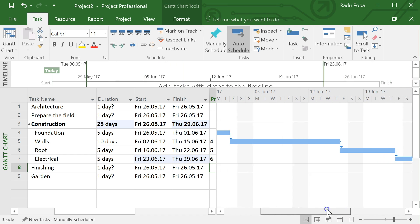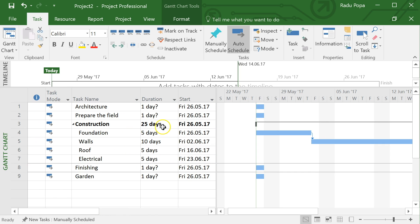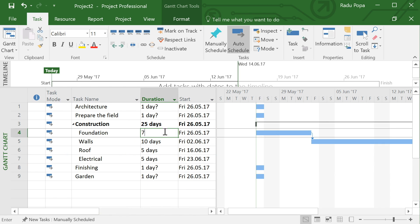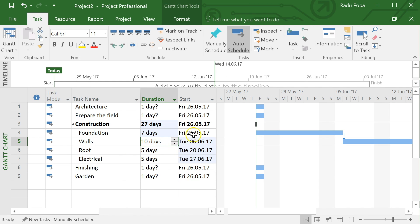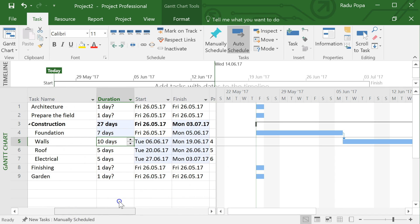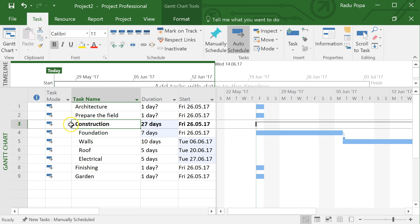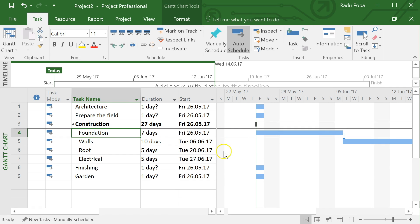This is much simpler than manually entering dates. If something changes — for example the foundation might take seven days instead of five — everything will adapt automatically. So the two key things so far are: the ability to indent tasks to create outlines, and the ability to set dependencies across tasks.